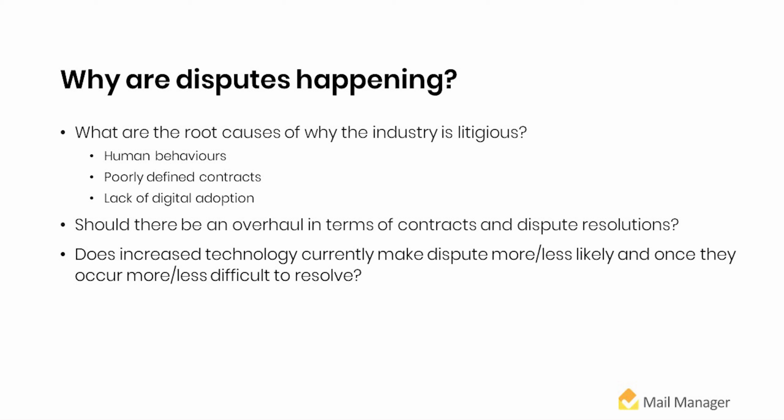And in terms of the culture and human behavior, I mean, we're dealing with an industry where you have a pyramid of contracts where people who are at the bottom of the pyramid don't have privity of contract with people who are at the top of the construction pyramid. And so that always creates stress because you're supplying services and materials potentially to a project for somebody else's benefit without the ability to claim against them directly and without an ability to communicate with them directly. And so inevitably, there's a two-way stream. One way is, am I getting paid? And the other way is, is there proper performance?